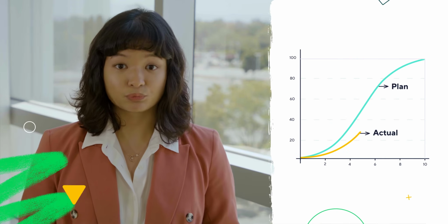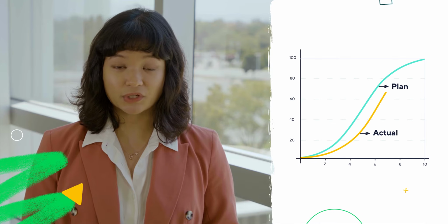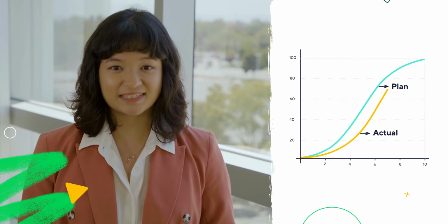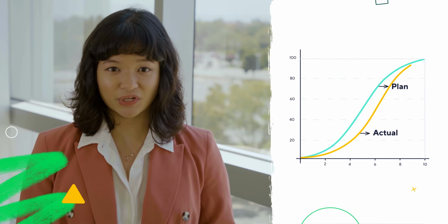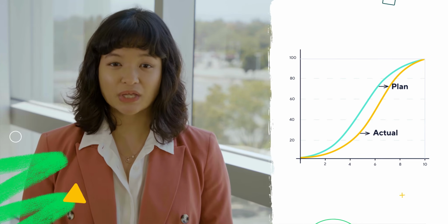The start of an S-curve will be shallow as you're ramping up resources, budget, or progress. The middle portion of the S-curve will be steep as the project gains steam. The end of the S-curve should flatten out as you head toward completion of the project and begin to slow the increase in resources to it.